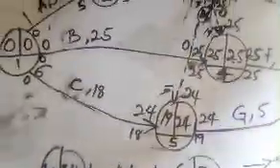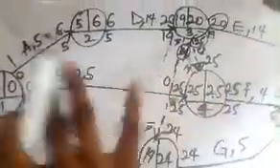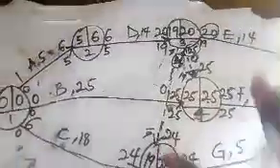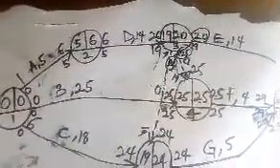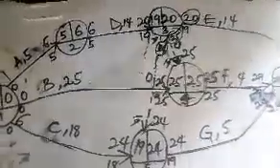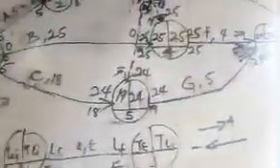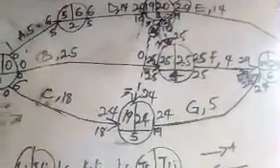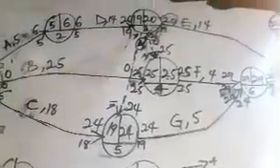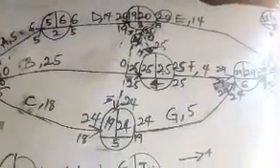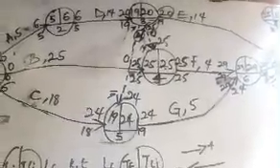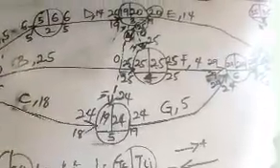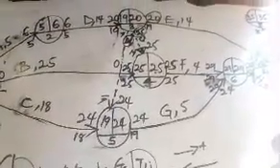So all you are going to do when you solve the question is just draw your activities, draw your nodes, and complete the diagram. Just to understand that. So when I'm done with this, the critical path is the longest path. As we can all see, we've completed the activity as a whole. So we are considering the critical path. The critical path is the path at which there is no slack. A path that does not have slack. Slack, S-L-A-C-K, is also known as float.